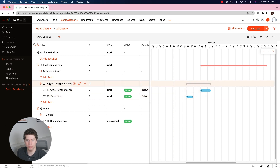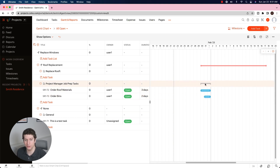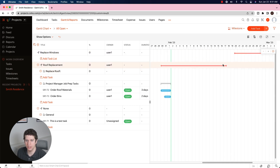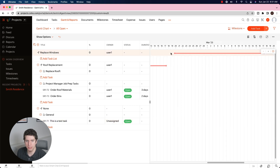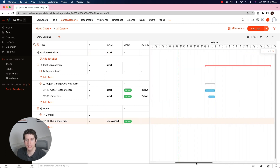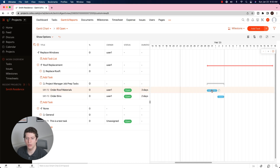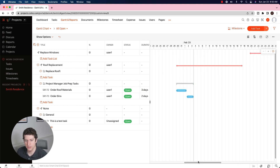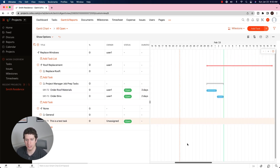For example, the Project Manager Job Prep Tasks are always as long as the tasks within them. If we start to overlap these a bit to create the desired overlap, that task list becomes only three days. We can see the Roof Replacement running from here to here, and the Window Replacement from here to here. You can extend tasks or link them so one is a required predecessor — meaning it only happens after the previous task has completed. That's the basic gist of how Gantt charts and project dependencies work.